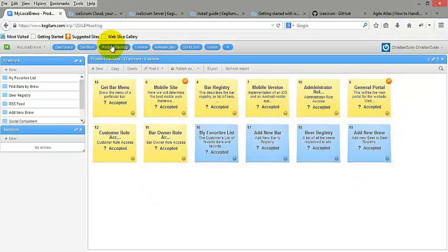And in the backlog is where the team begins to estimate their stories. Here the team comes in and they can add a number. This is what is usually determined in a planning poker.